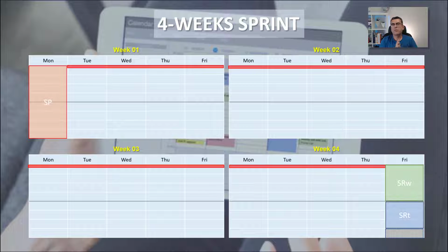And the Scrum guide says that you should start your next sprint immediately after you finish the previous sprint. The first question is, when are you gonna start your next sprint? Is it on Friday at 5 o'clock or 4 o'clock Friday, or are you gonna wait until Monday? So the best idea, what I see people doing, is they will start the next sprint on the next Monday.